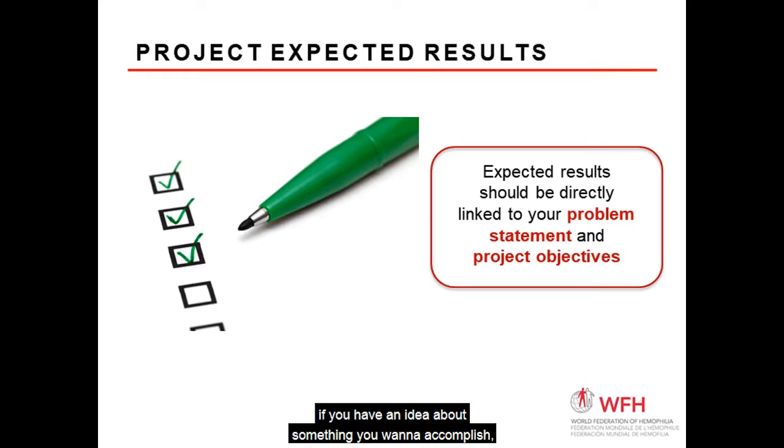One thing about evaluation: if you have an idea about something you want to accomplish and you didn't meet the objective, you didn't meet your goals, does that mean that the project failed? Actually, in reality, not necessarily. What it might mean is that along the way you're evaluating and you didn't realize that you were going to have a very difficult time getting a meeting with the head of the hospital. And getting this meeting was one of the big problems you had in accomplishing your task. However, maybe you learned in the meantime that there was someone else who was an advocate in that hospital who could help you achieve the goal, and you figured out a way to go around that. That would be a really good thing that you found in your evaluation. So don't think that because you didn't hit your numbered goal that you originally stated, you failed. You learned along the way how to do this and accomplish your goals in the future. That's actually a really well-learned lesson.